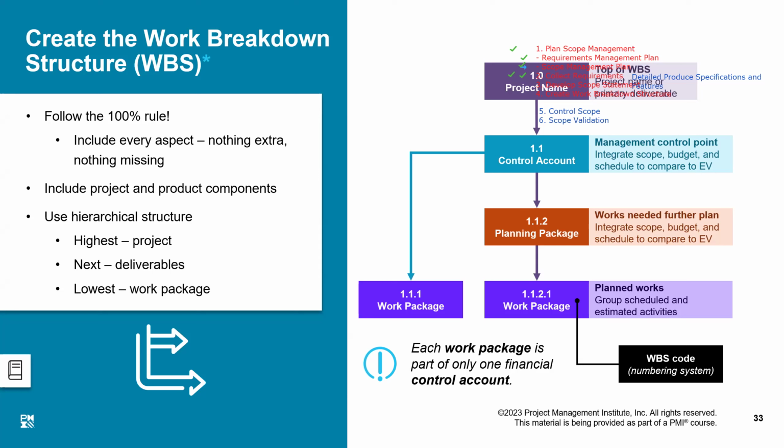For example, I am constructing a 3-story building. Each story is considered a control account, right? That means the accounting of every floor is the responsibility of a separate manager, who might be responsible for the construction of that floor, but is also responsible for taking care of the budget allocations on that portion.